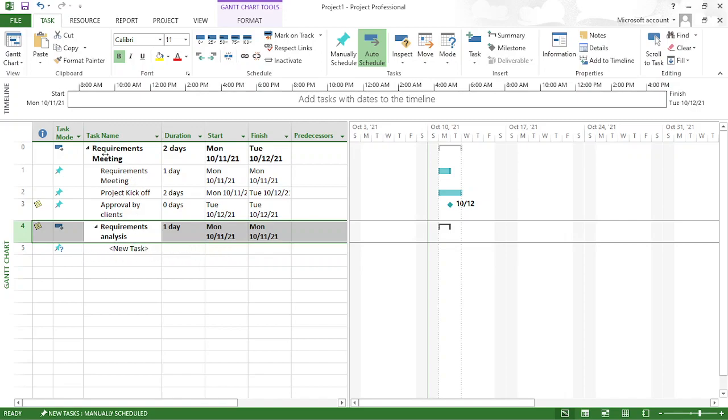And specifically, you can see there are two summary tasks are available. These summary tasks are like this shape. That means it's not a work, it's like an overview. Like in any given book, there are different topics available, right? Table of contents. Likewise, this is the main topic, this is header 1, and these are the subtopics available. So a summary task is not doing any work. We are not allocating any work, but it's the overview of the entire plan.